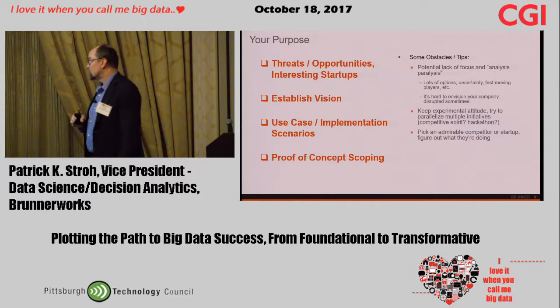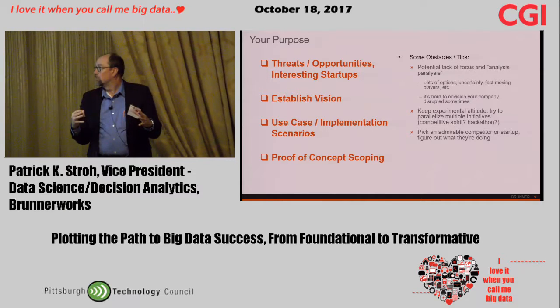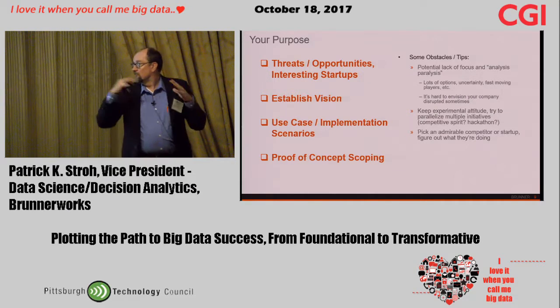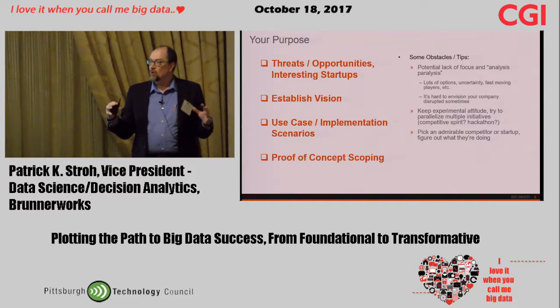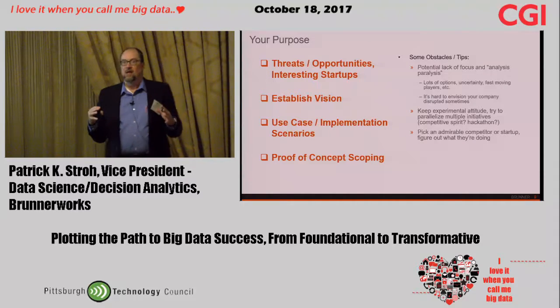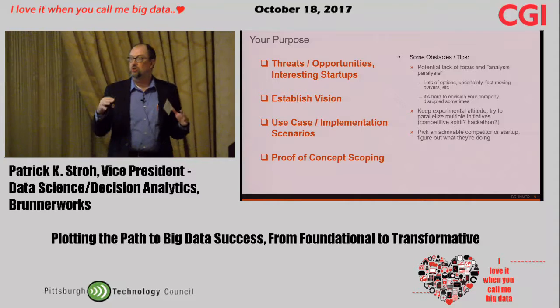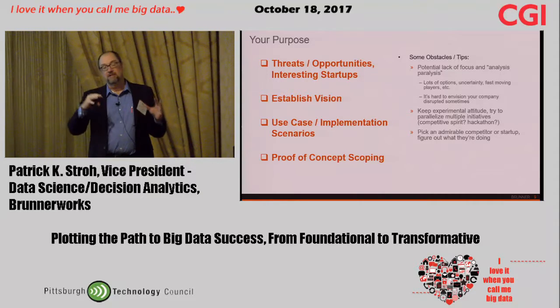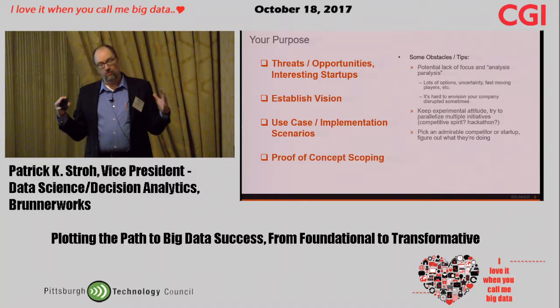Then establishing a vision about where you're going to go, what kind of area you're going to explore, developing use case and implementation scenarios. I wouldn't spend months doing this, which some organizations are quite capable of doing. I would try to spend less than a week or two in developing use case and business case kinds of scenarios. And then think about a scope of a proof of concept for your particular product or big data implementation.